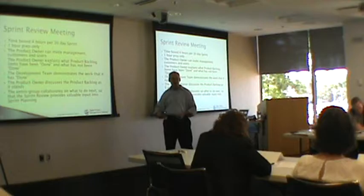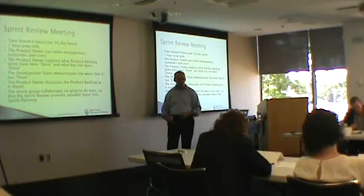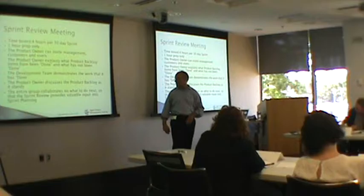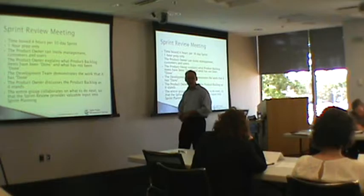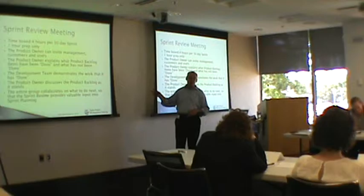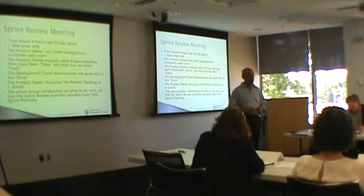The product owner discusses where the overall backlog is. If they're working on a release plan, they say this iteration was part of the overall release, or part of the overall vision. The entire group collaborates on what to do next. This is an opportunity to have your stakeholders there — tell them what you've built, tell them what you're going to build. Is there anything that needs to be included in the next sprint planning? Because this meeting is right before the sprint planning meeting, either the same day or the following day.